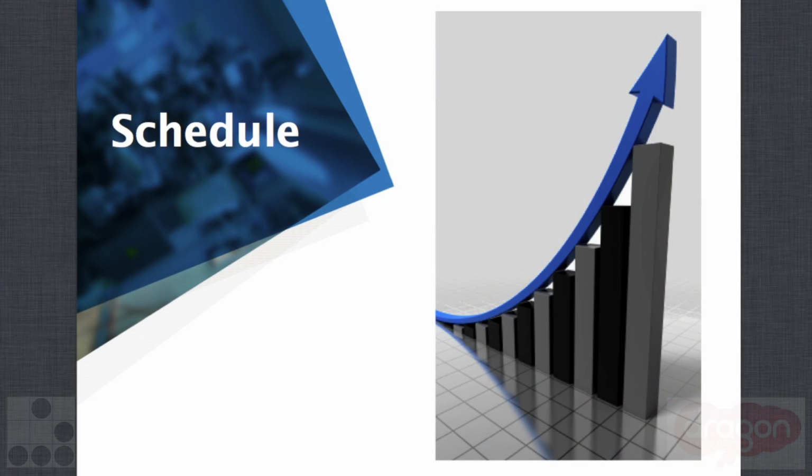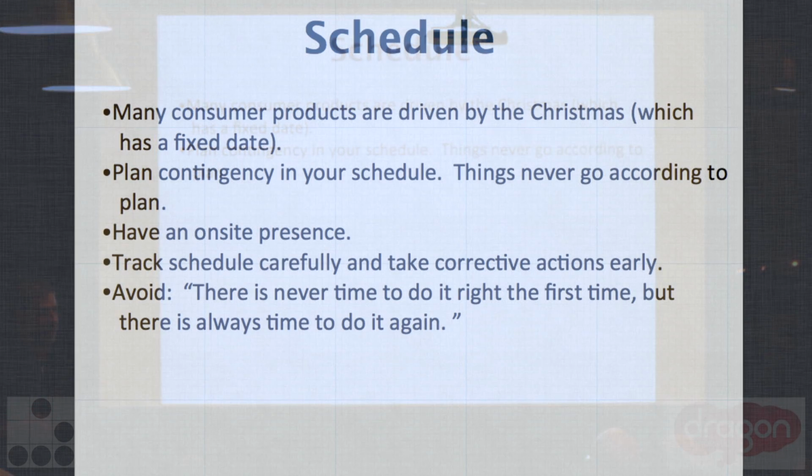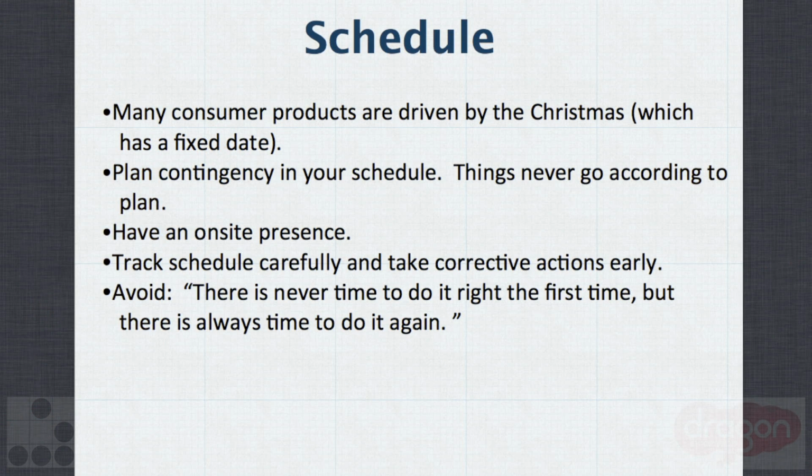So absolutely, and Daniel, who's here, who did all the software for the first Roomba and also helped me build my real baby, we were late on the baby and we lost a tremendous number of sales because of it. So we got that lesson drilled into us: don't be late. The way you avoid being late is you have contingency, and we all know that things take longer than we ever planned. So build that in.